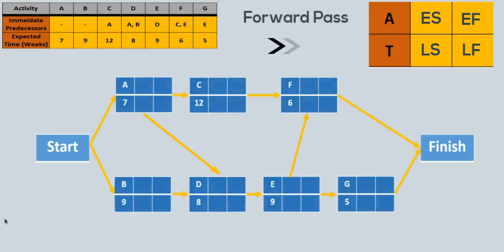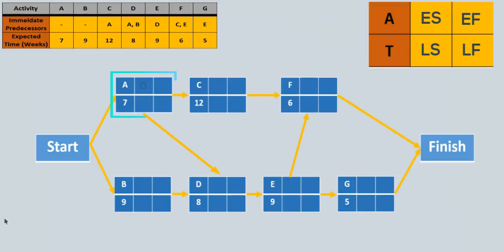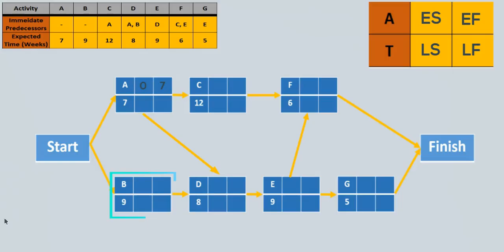Let's do the forward pass. A has no predecessors, so its earliest start time will be 0. Since it has 7 weeks to be completed, its earliest finish time will be 0 plus 7, which gives 7. B also has an earliest start time of 0, and with an activity time of 9, it will have an earliest finish time of 9. Now C needs A to be completed before it can start. Since the earliest finish time for A is 7, the earliest time C can start is 7.